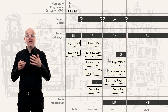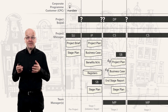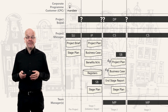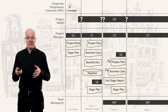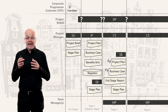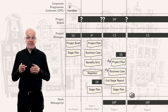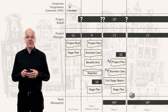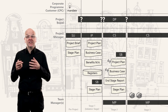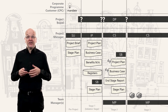Now the project manager can start the next stage and they will use the stage plan to help them — it's a plan they can use each day. They start by choosing product descriptions from the stage plan and handing these out to the teams. They discuss each work package with the team manager; a work package contains one or more product descriptions.